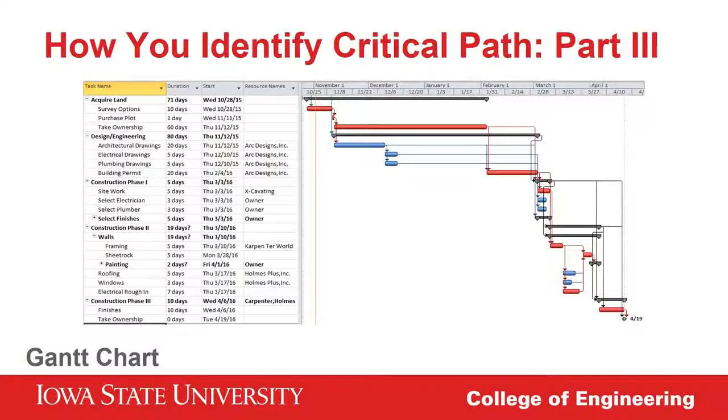As expected with any scheduling method, there are disadvantages. One being that, to fully take advantage of the tracking ability of the software, the completion percentages need to be manually updated, which takes time. Time is hard to find. Also, for massive projects, though taking many months or even years to complete, the chart becomes quite large and difficult to share in regular reports.